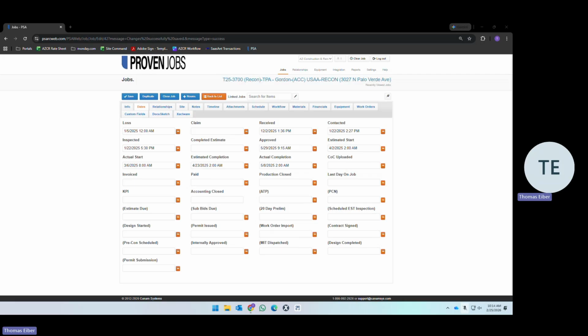So how you measure your own success. 90% plus adherence to estimated start and completion dates. So if you're putting in an estimated start and completion date, 90% of your jobs, so 9 out of 10 jobs, need to start and complete on the dates that you've entered, with some tolerance allowed. The other 10%, those are things that we allow to happen. We're looking for avoidable issues.